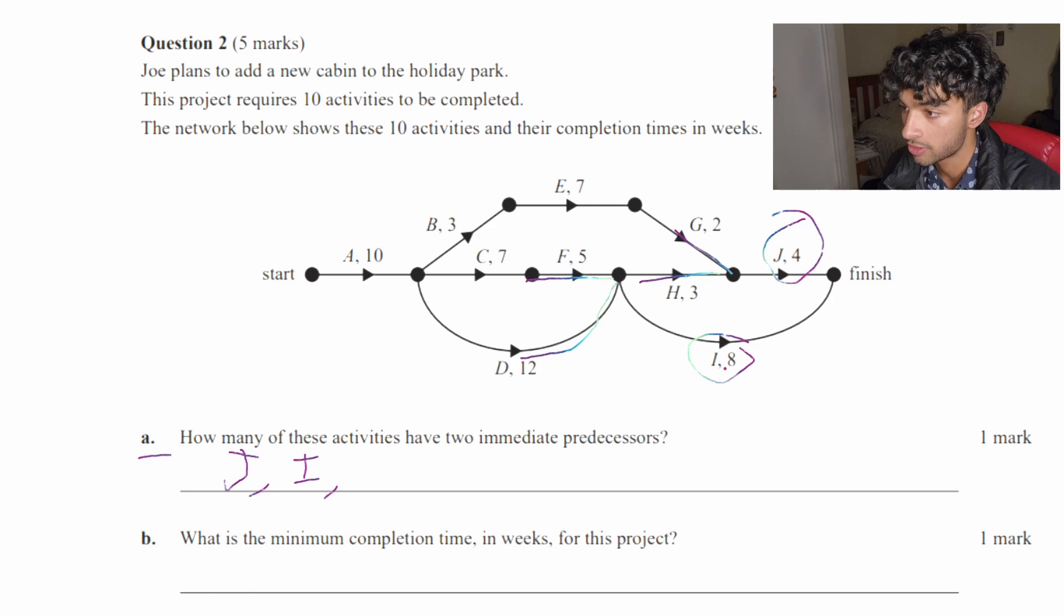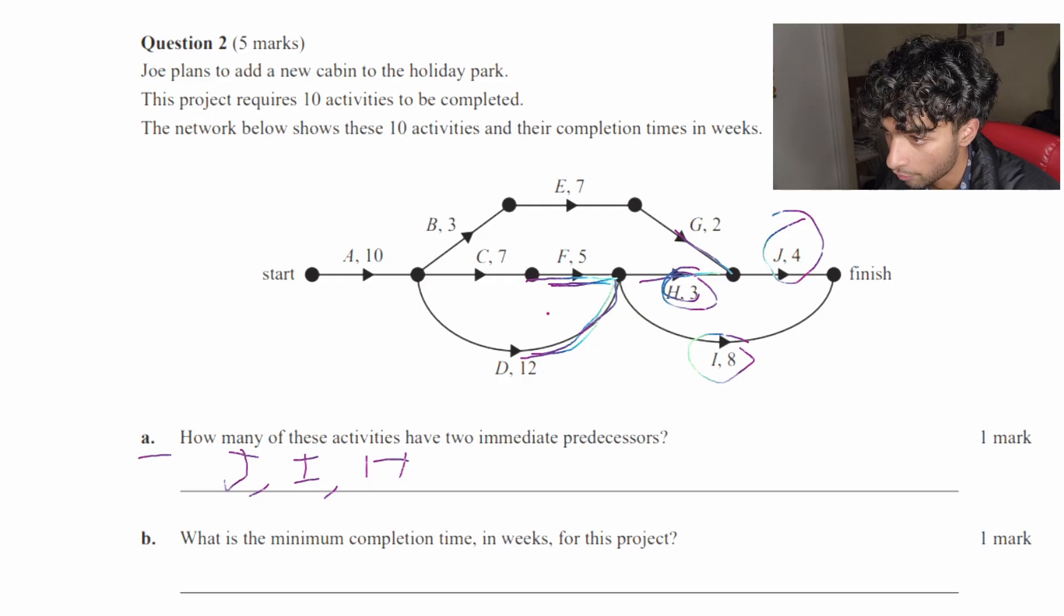And it's really hard to see if this one actually has two predecessors because there's a curve and people don't really see that curve that much. And with activity H as well, it has two predecessors. And as we go through the graph, you can double check if there's any other predecessors where there's two predecessors, and there is not. So it's just these three: one, two, three. So three activities.